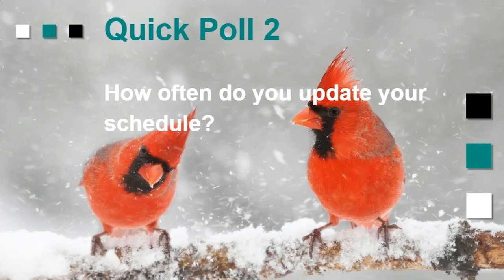So I'm going to ask another quick question. How often do you do your updates? Now, this, of course, will depend very much on the kind of project that you're doing. If you're doing turnarounds, large turnarounds or shutdowns, very often you're going to be doing those daily. If you're doing capital projects, you might be talking about, oops, I think I actually put the wrong question. I picked the question of how long does it take you to do updates? So I think that also depends on the kind of projects that you're doing. If you're doing capital projects, it's often that you might take over a week to get your updates in.